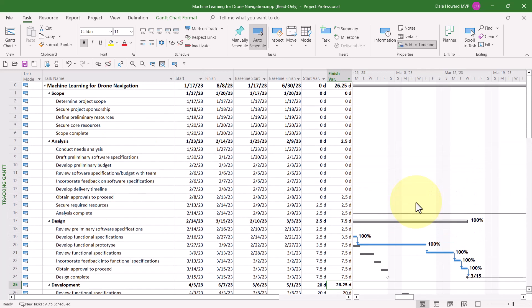So, at this point, if you do see Finish Variance in your project, you may be wondering about, well, how about work hours? How are we doing on work hours? In that case, we'll go to the third location where we can analyze variance, the Work Table.